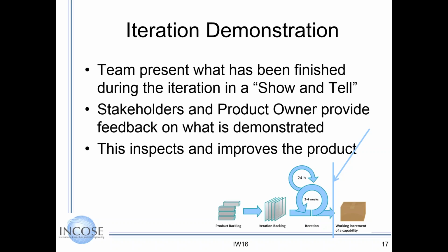So at the end of your 2 weeks, you have a demonstration. The team presents what it's just finished. Now, we recommend that you don't over-prepare for this. You show your work. If you're doing requirements, you show the requirements.